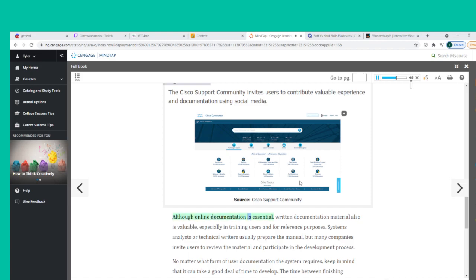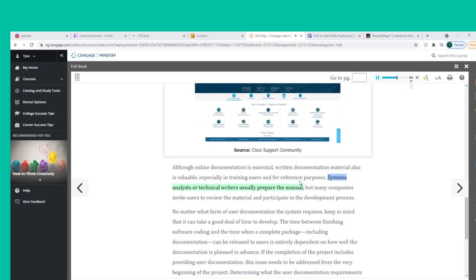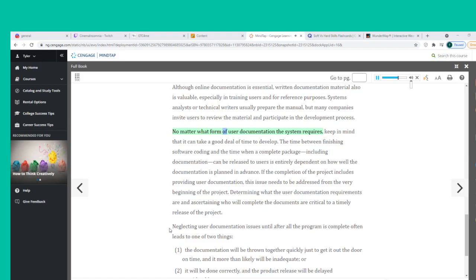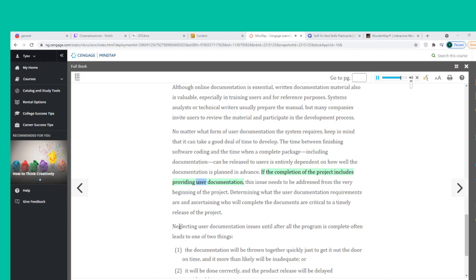Although online documentation is essential, written documentation material also is valuable, especially for training users and for reference purposes. No matter what form of user documentation the system requires, it can take a good deal of time to develop. The time between finishing software coding and releasing a complete package including documentation is entirely dependent on how well the documentation is planned in advance. If the completion of the project includes providing user documentation, this issue needs to be addressed from the very beginning.